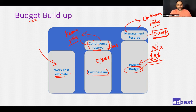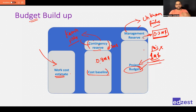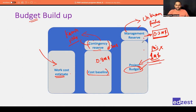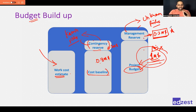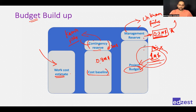If the project manager needs management reserve, they must take approval from the sponsor or an approving authority. Management also keeps this reserve because they are getting money from investors or banks, and they need a buffer so that if a mistake happens, they don't have to go back and ask for more money. Contingency reserve is for known risks; management reserve is for unknown risks — mistakes or events the team could not identify.